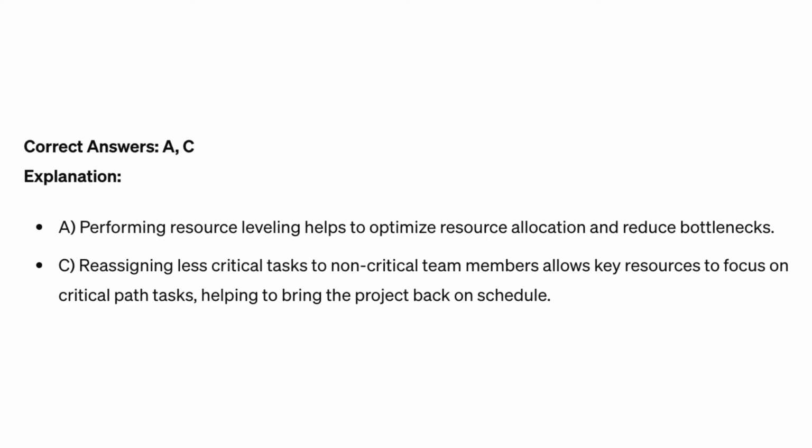Correct answers A, C. Explanation. Performing resource leveling helps to optimize resource allocation and reduce bottlenecks. Reassigning less critical tasks to non-critical team members allows key resources to focus on critical path tasks, helping to bring the project back on schedule.